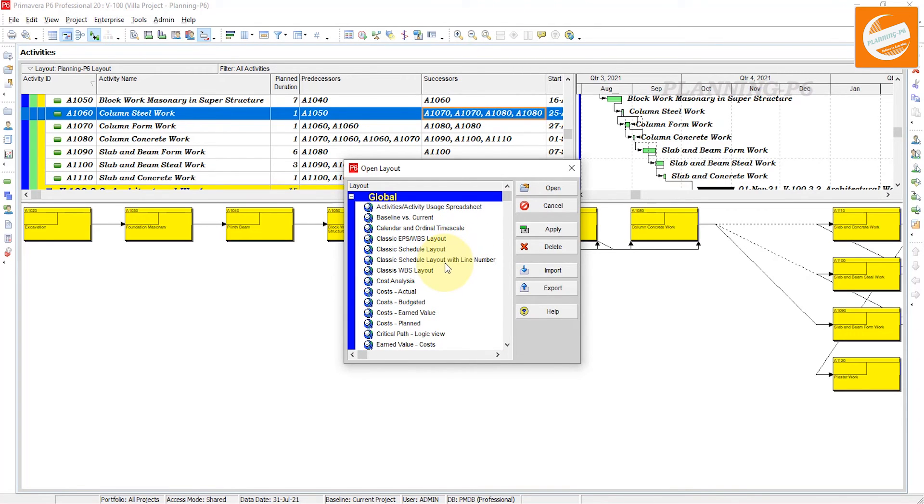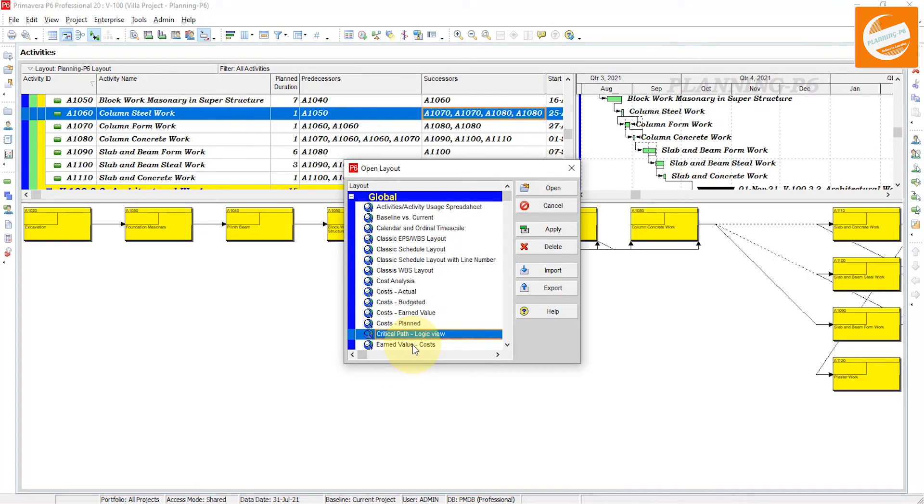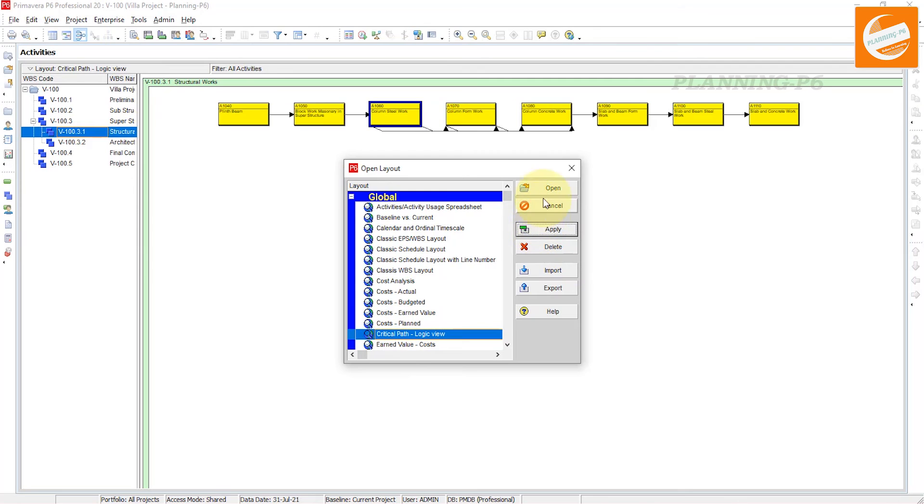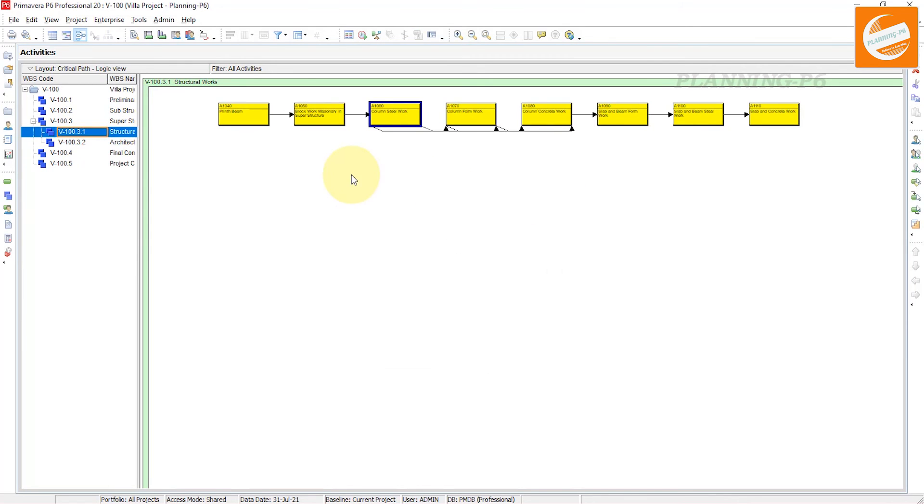And see the critical path logic view. Apply that one and open. Now this is for that WBS - it's showing the logic at the WBS level.